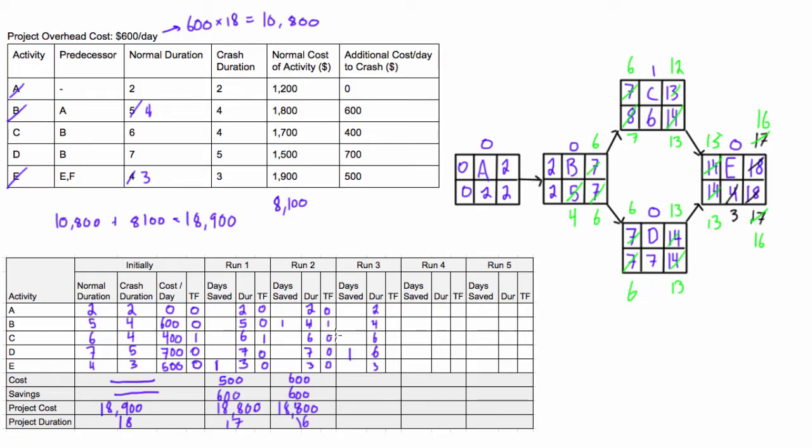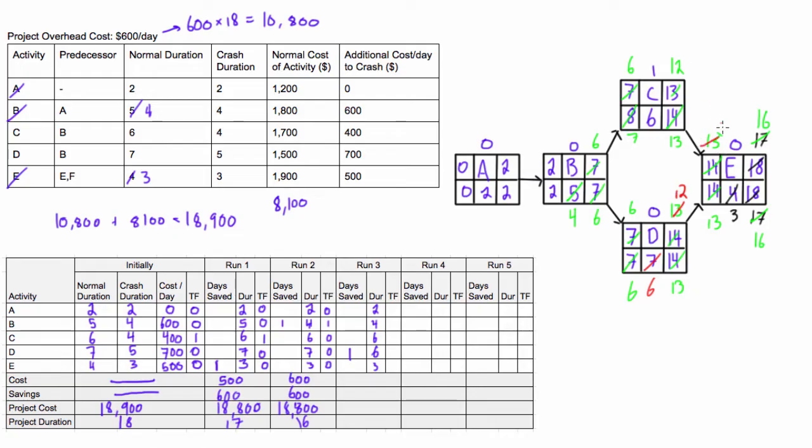All right, let's change our color again and let's go through and figure out what's changing for our total floats. So we had activity D. We cut that. We're gonna change the color again. So that's down to six and then six plus six is 12. Now we're looking at here. We're gonna bring either a 12 in or a 12. So now we get this will be 12. 12 plus 3 is 15. Bring the 15 down.